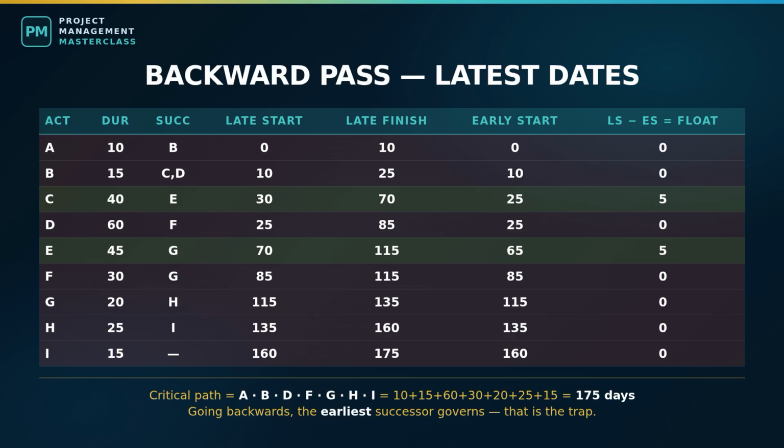Now look at what that tells you as a manager, because this is the entire point of doing the arithmetic. The critical path runs straight through the pole attachment agreement, 60 days, and it is the single activity over which you have the least control because it sits inside somebody else's organization. Your instinct is to go and push the boring crew because they are visible, they are yours, and pushing them feels like managing. The arithmetic says pushing the boring crew is worth nothing. The project's fate is sitting in a utility company's inbox. That is a completely different management strategy, and you cannot arrive at it by looking at a Gantt chart and worrying about whichever bar looks longest.